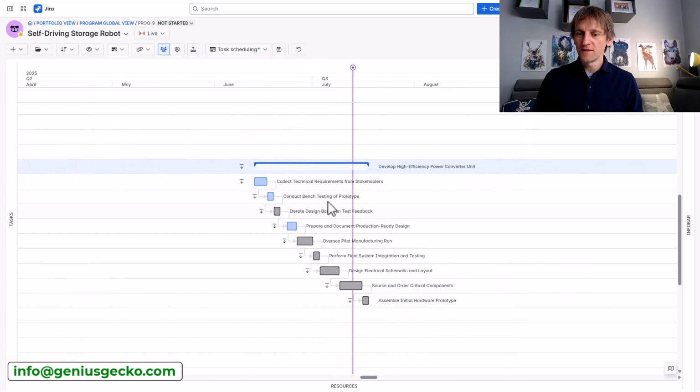And what does it give us? Well, it tells us that this 1 month long task is broken down into smaller elements. We have 9 of them, and we can see that the first one is in progress. The second one is in progress. The third one is actually not started. It's in a backlog status, and the fourth one is in progress, right? So if we are over here in time, meaning that we should be in the middle of the pre-last element, we can see clearly that we are severely screwed.